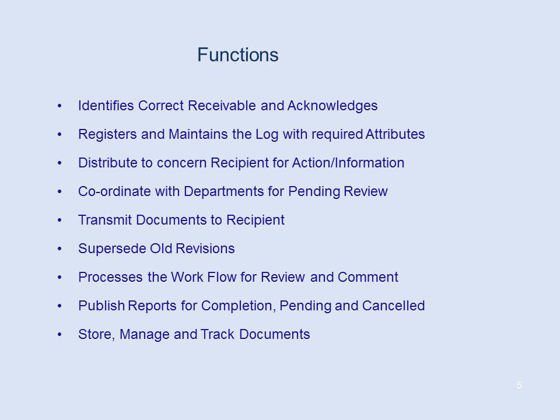Transmit document to recipient. Once the project team is ready with all comments and review of document, it comes to document controller for transmitting to recipient. And he prepares a transmittal properly addressing all comments and revision and status of a document. What is transmittal? It is a covering note sent with the document to client or vendor specifying the details of documents attached and expecting recipient to acknowledge the same.